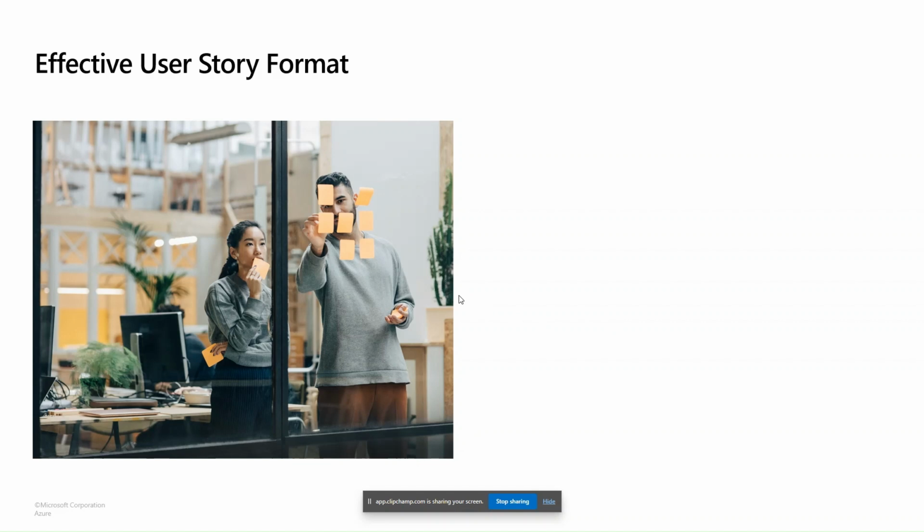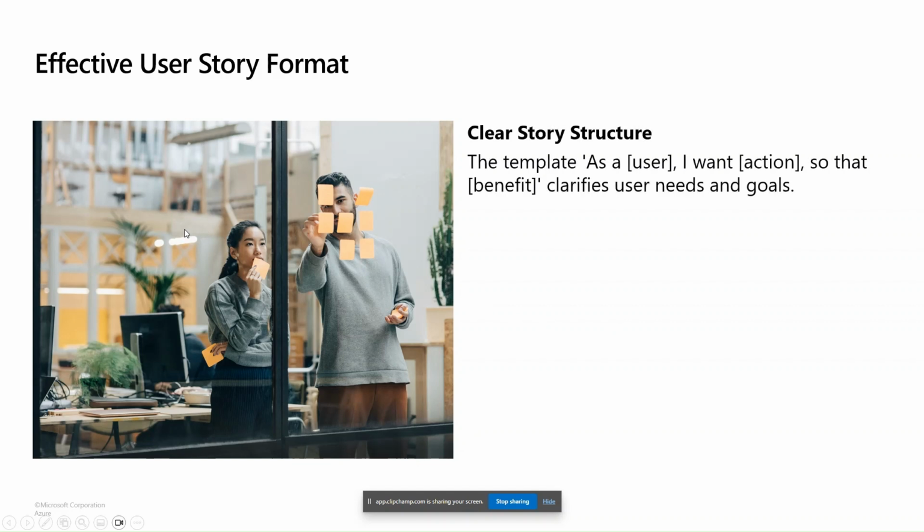Before we deep dive into Azure Boards and creating some user stories, since this session focuses on the user story, you should know how to create an effective user story. An effective user story has a clear structure. This is not a fundamental requirement, so you don't need to follow this template, but following this template will help you make it more consistent. The template is: as an actor or user, I want to do some action so that it has a benefit.